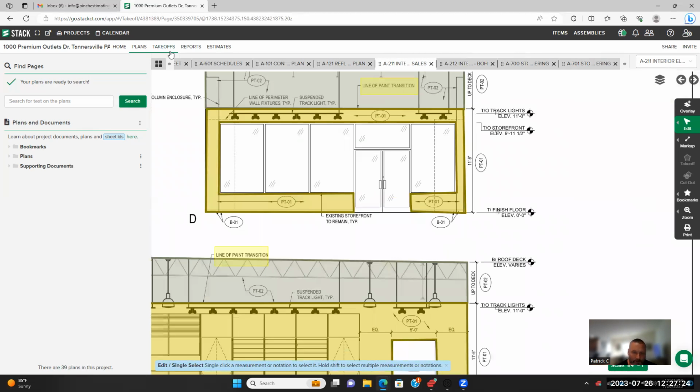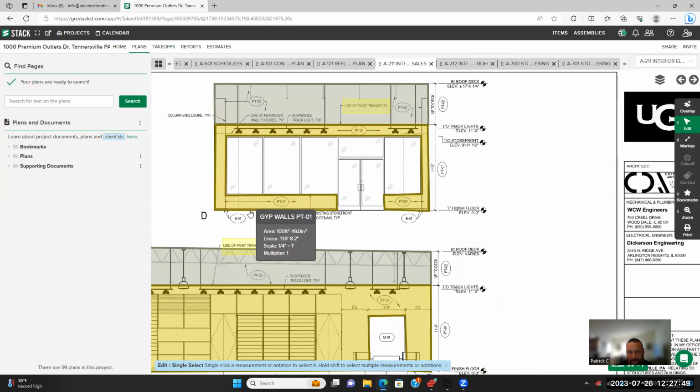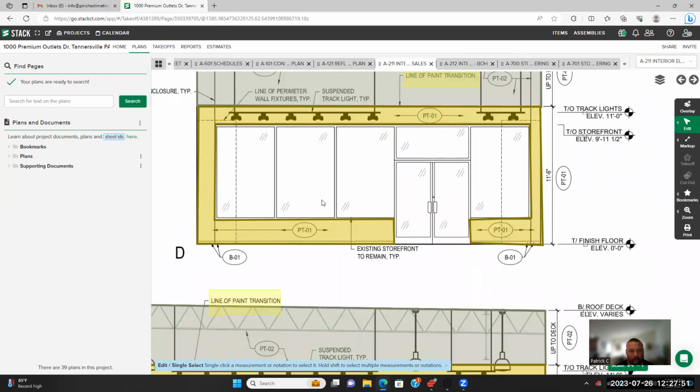So what I'm going to do is I'm going to add any shelf painting because I can't tell what it's called as an alternate. So shelving as an alternate. Because we can't tell what is and what isn't getting painted, but we do have that miscellaneous detail that seems to suggest that we are painting some.